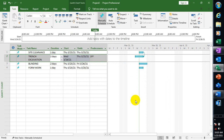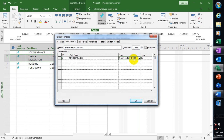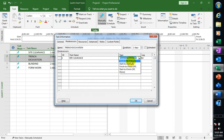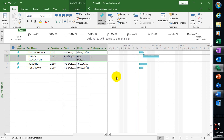I'm going to switch this back to Finish to Start — I'll finish my Site Clearance before I start my Trench Excavation.